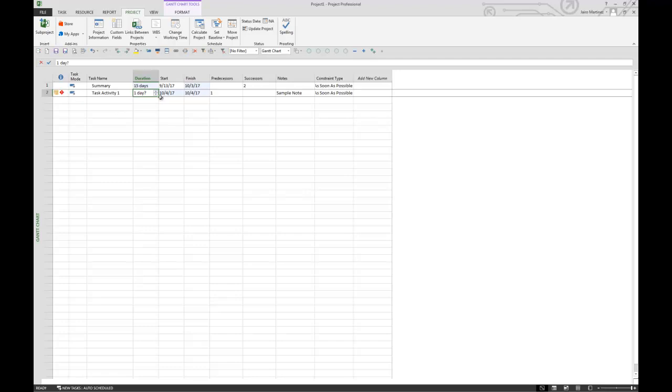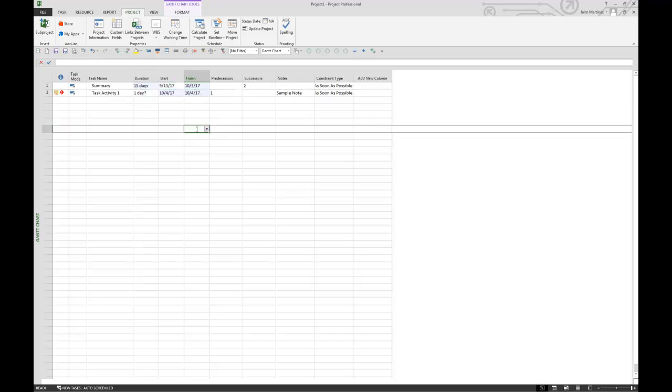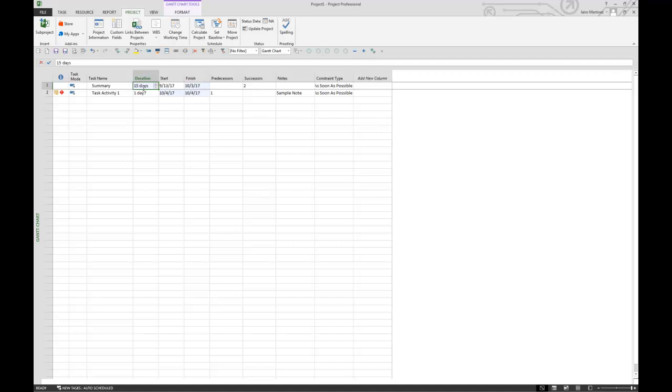And guess what? I get that dynamic change, because if something does get pushed to the right, I still want to see the impact regardless of whether or not it's something I want to deal with. I get to see that impact. So by having that deadline set, we're able to see that dynamic change in our network when changes occur. I like to go through this example with the deadline because it provides an excellent alternative to using a hard constraint or a semi-flexible constraint.